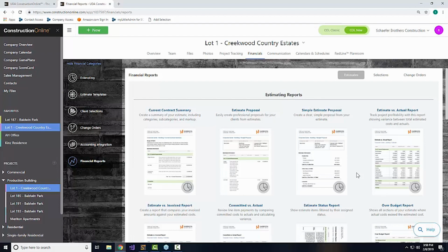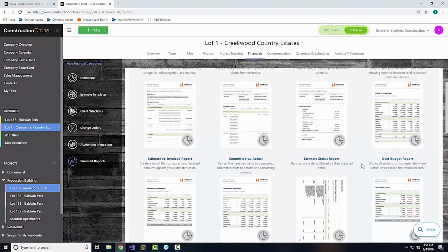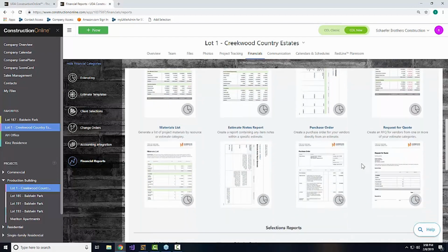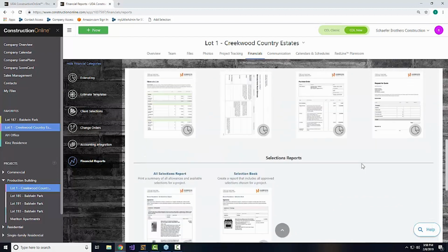That's right. Now, the other component that really comes into play when you're initially creating your estimate, if we look at a timeline of how that contract is going to come together for you, you've of course got the estimate that you're building out. The other piece that will come into play for many of you will be specific allowances, and those are imported from your selection sheet and added on to the total of your estimate contract, so that when you print that proposal, you have the option to have those allowance amounts detailed at the bottom. The client can see, okay, here's what we're estimating for, here's our budget, and here are the things that we'll need you to choose and how much money we're allocating for those.